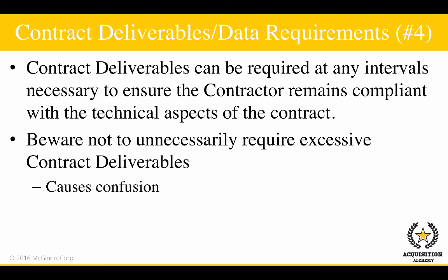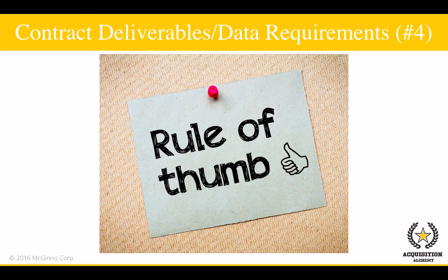Requesting too many contract deliverables can cause confusion, waste valuable time, and distract contractors from focusing their efforts on more important aspects of the contract's actual performance. The general rule of thumb is to limit data collection to what's needed by the government to make decisions or comply with other higher-level requirements.